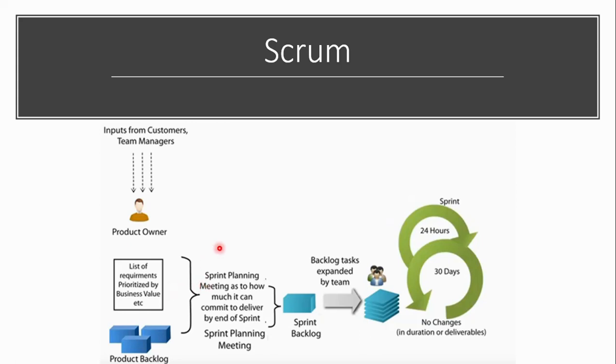So once that is done, then for what they call the iterative cycle, they call it a sprint. What they define in this framework is that each iterative cycle is called a sprint, and before an iterative cycle starts, there will be a sprint planning meeting with the development team, the project manager, and then there is something called the Scrum Master.